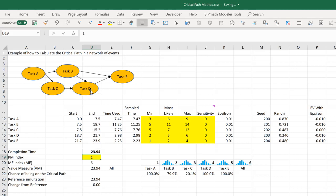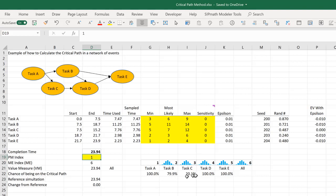D will always be on the critical path, as will E and A. And that's what we're seeing here in these results. But how do we calculate these numbers?